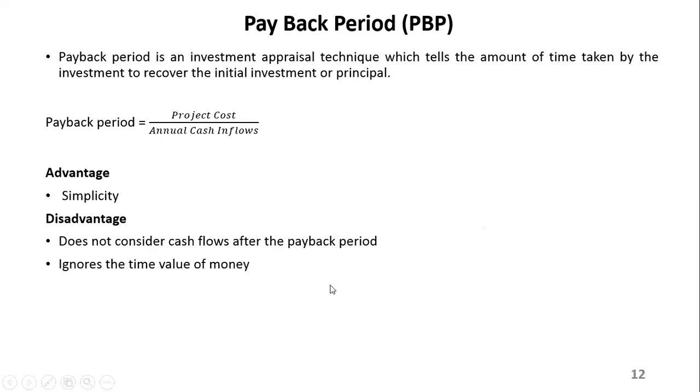A lot of things can happen there also. Maybe the project will cover the amount that was invested, but after that, the operation may start running at a loss again, subtracting from the initial amount gained. And most importantly, it ignores the time value of money.